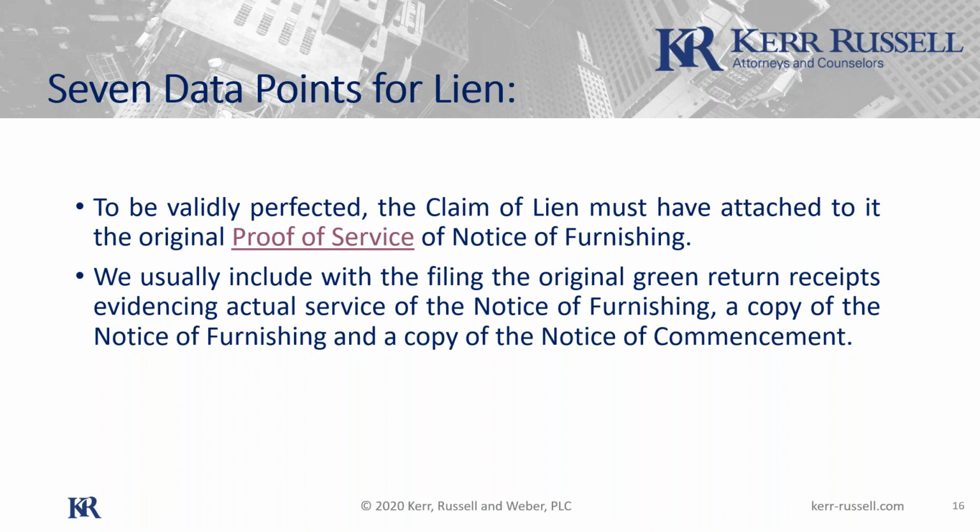Your contract for 100, the approved change orders for 10, and then that 5,000 that you've submitted, but there's a dispute about, as long as it's in good faith, that's okay. Then you would indicate to the reader in the claim of lien what you've been paid to date and then the corresponding amount still owed.